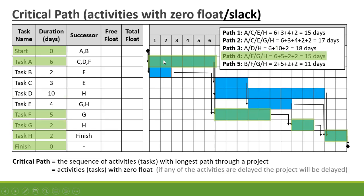Path 4 is A→F→G→H: 6 plus 5 plus 2 plus 2 equals 15 days. Path 5 is B→F→G→H: 2 plus 5 plus 2 plus 2 equals 11 days. The critical path is the sequence of activities with the longest path duration, which is Path 3 with 18 days.